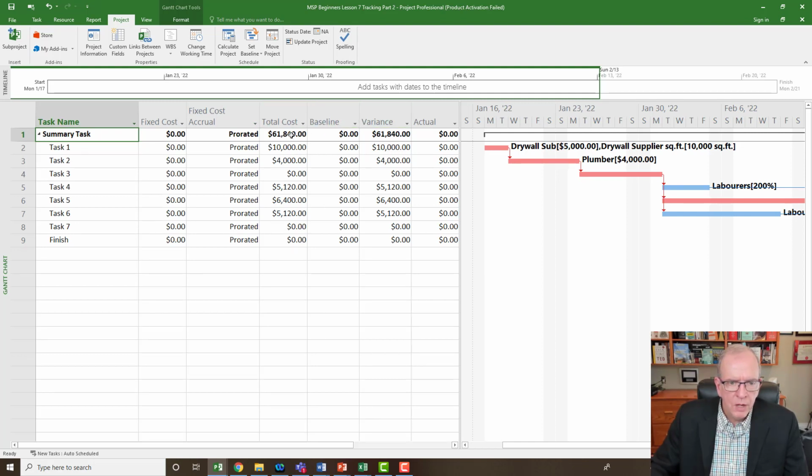Well, what Microsoft Project would do is it would copy and paste all these costs over here, like digitally it would do that, right? And that means that whenever you make a change, you can always see and compare what's the change impact compared to the baseline. So then after that, it will show you a variance once you've set the baseline.